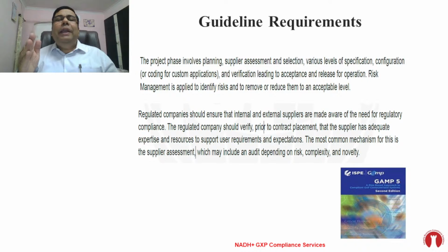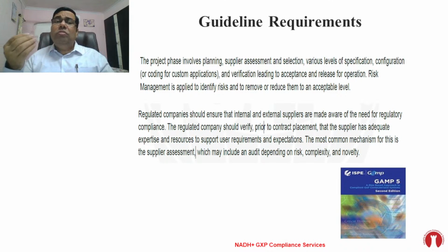Risk management is applied to identify risk and to remove or reduce them to an acceptable level. Regulated companies should ensure that internal and external suppliers are made aware of the need for regulatory compliance. The regulated company should verify prior to contract placement that the supplier has adequate expertise and resource to support user requirements and expectations. So that is how you can evaluate that the supplier has adequate expertise and resources to support your requirement and expectations.